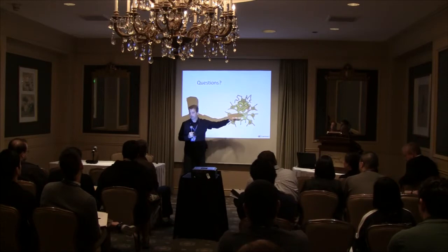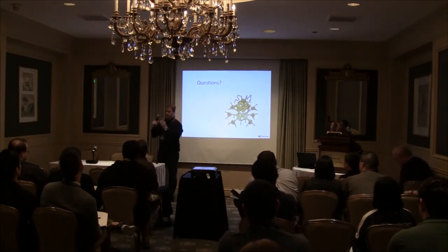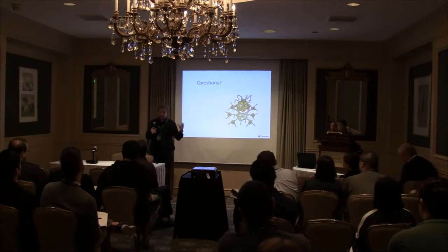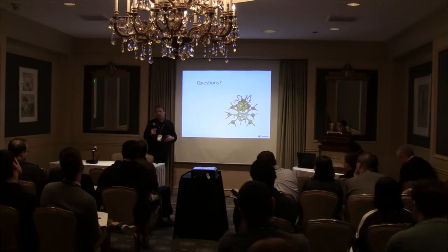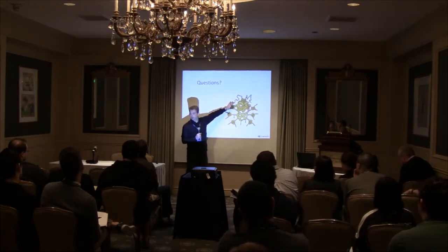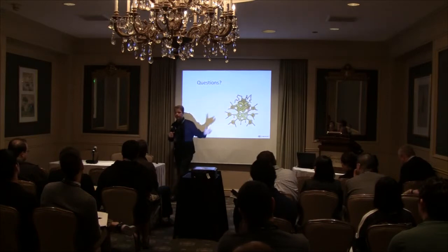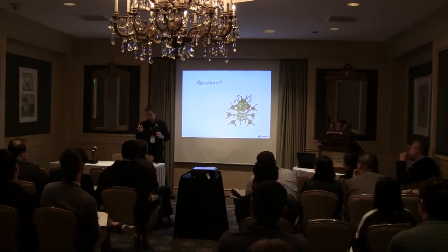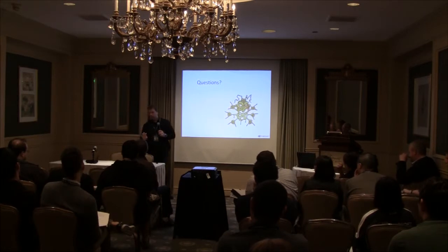you don't have to show that it's going to be 50% lower. 40% savings, 30% savings, that's a significant amount of time, especially depending on your team size. You've got 100 people and you're going to have 40% fewer bugs by the time you get to alpha. That's probably going to cut your alpha hours significantly. So start using that empirical data, looking at the bugs you're generating per sprint and completing, versus the bugs you have in your database, if that makes sense.